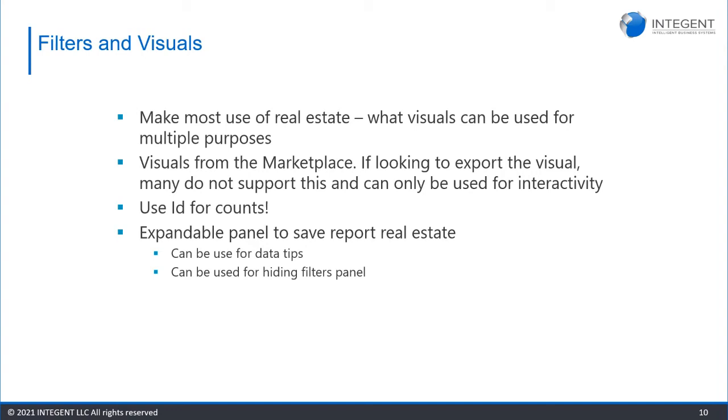If you use task name and you look for unique ones, that's only one. It's not going to show you for 10 projects. It's only going to show you one. So use ID. Also for any stacked bar graphs that need to use that, use ID for those unique ones as well.